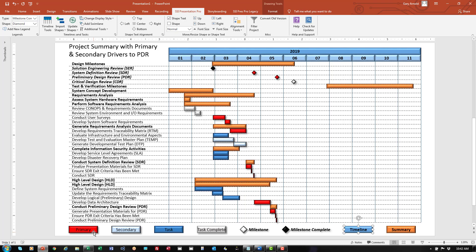Notice now that all of the primary drivers as identified by text field 10 in Microsoft Project are colored red. All the secondary drivers are colored with this light blue color. Tasks that have no identification in text field 10 are just blue. However, tasks that are complete are gray. Milestones that are not complete are gray. Milestones that are on the critical or primary driving path are color-coded red. Milestones that are complete are black. This is the legend that controls the style of the timeline, and this is the legend item that controls the style of the summary — all of these orange bars.